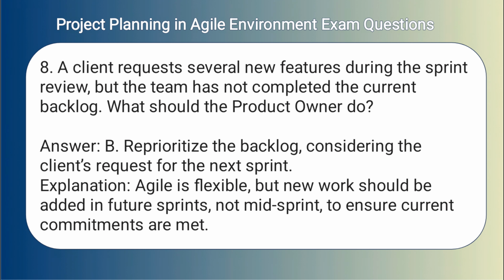Answer: B. Reprioritize the backlog, considering the client's request for the next sprint. Explanation: Agile is flexible, but new work should be added in future sprints, not mid-sprint, to ensure current commitments are met.